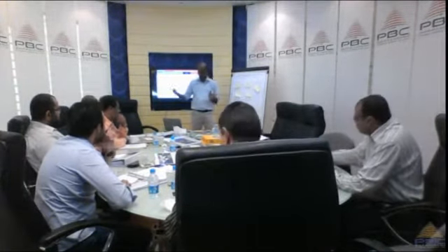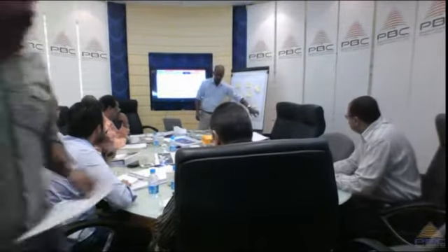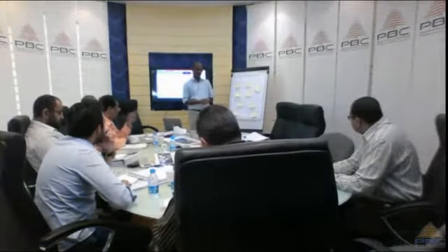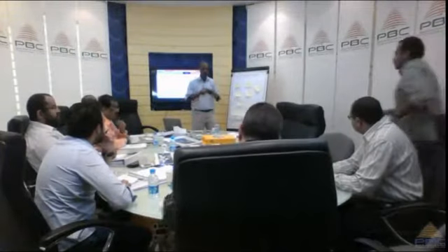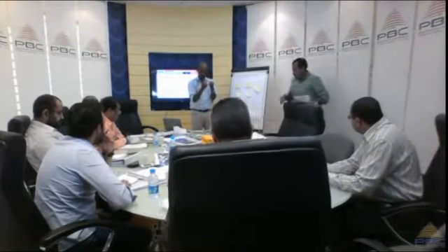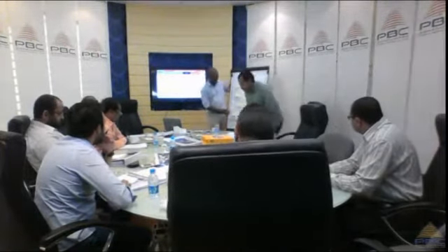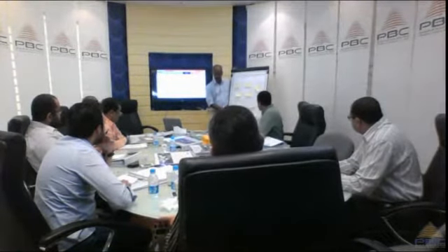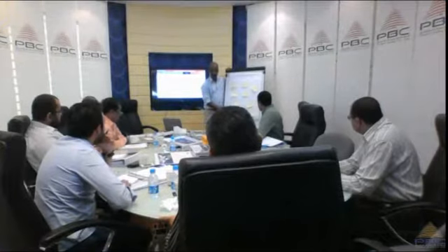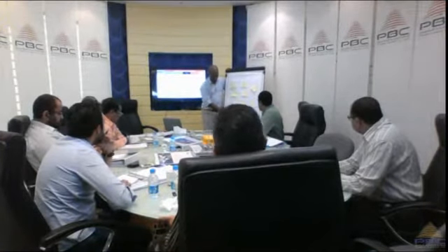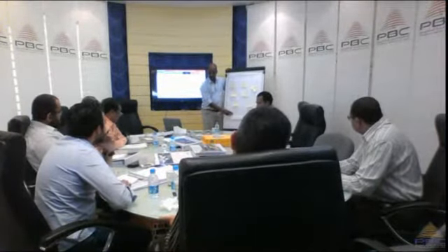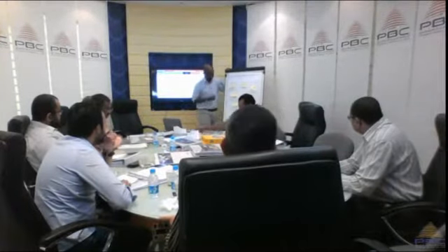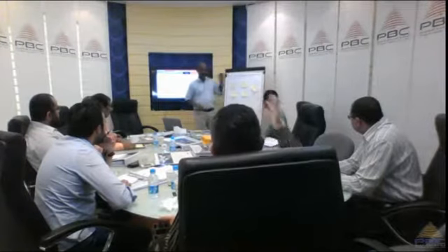The cost reimbursable is preferred by the seller. So in order to bring the buyer a little bit closer, we have these other types to encourage the seller to kind of come halfway. On the other side, we have the fixed price. So we have the fixed, FFP is what? Firm fixed price, okay? And fixed price with incentive fees. These are the 2 types.